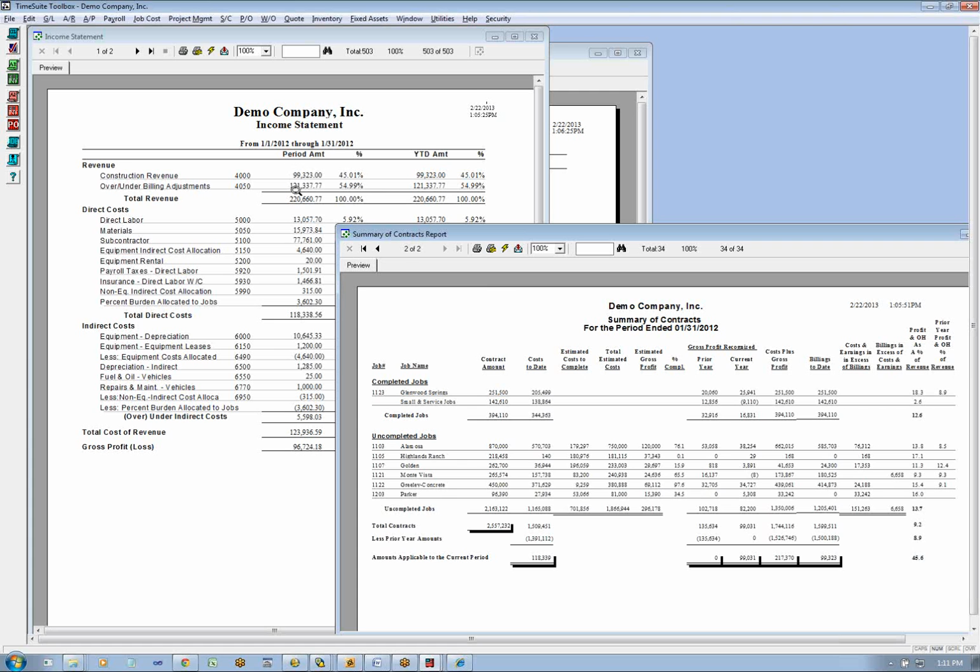My cost plus my margin gives me my cost plus gross profit. So my cost is in here, my billing is not in here. If I were to calculate my billing, it would be cost plus my margin, right? So my billing should be $33,000 if this is accurate. If I say this is $30,000, I'm going to come up with an underbilling and put that in my revenue account. So it's important for this to be conservative so that you're not overstating your financials, but not too conservative so you're not completely off either.